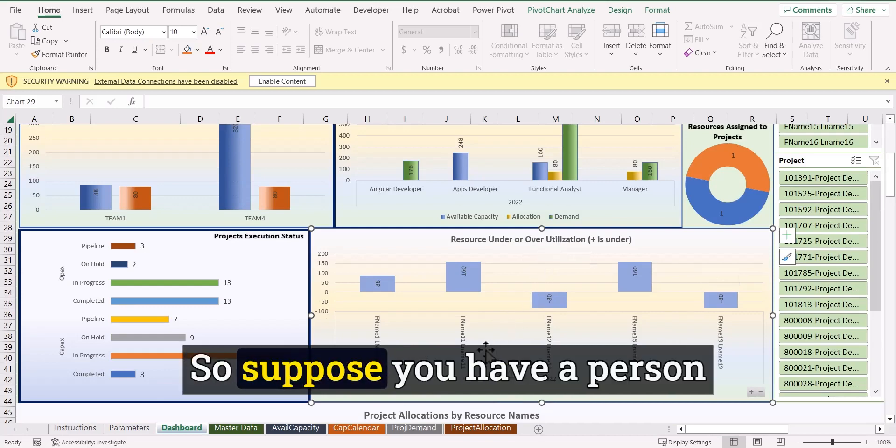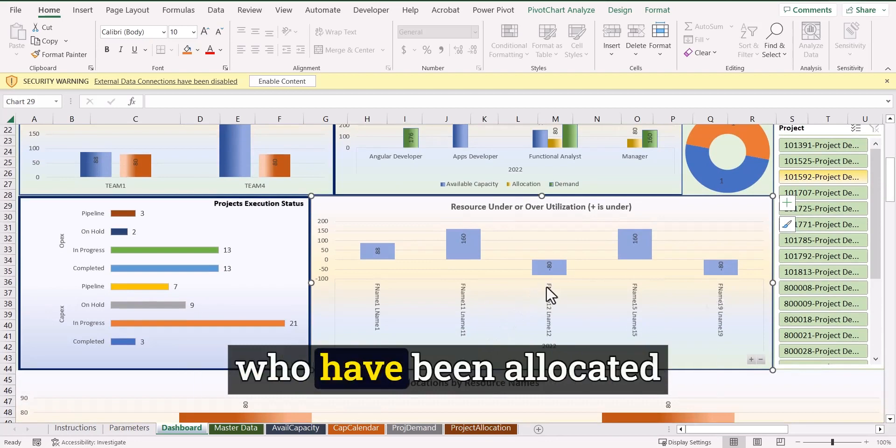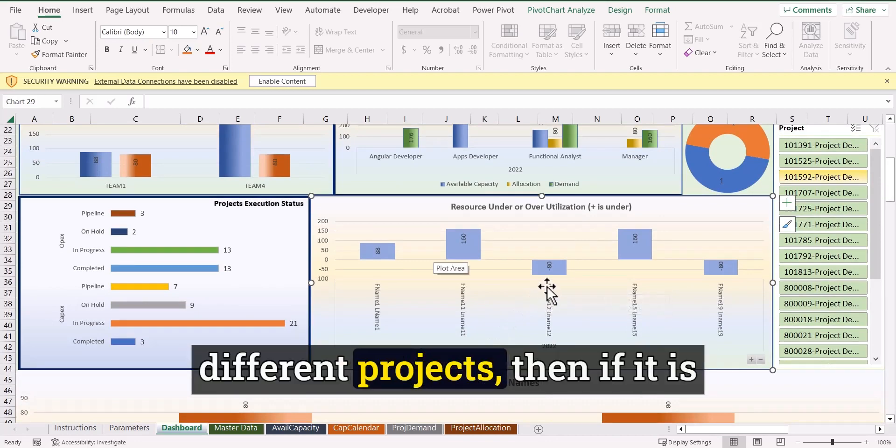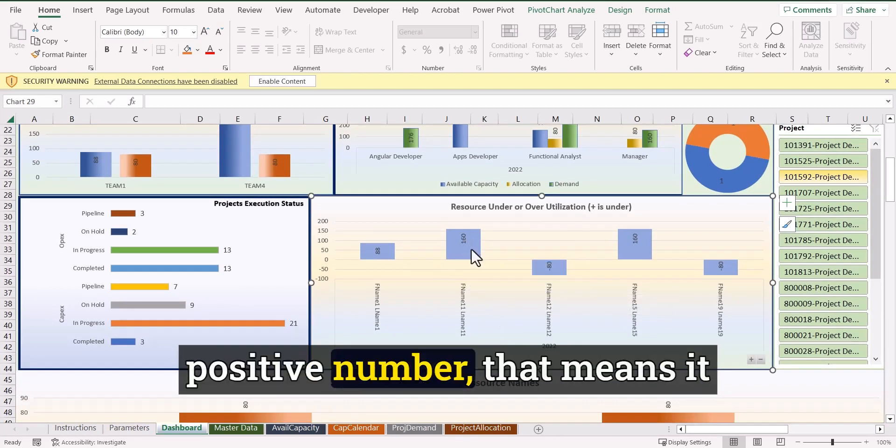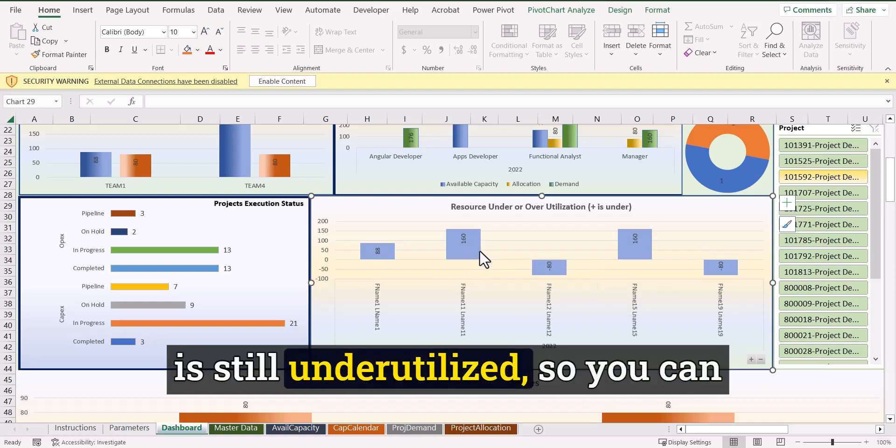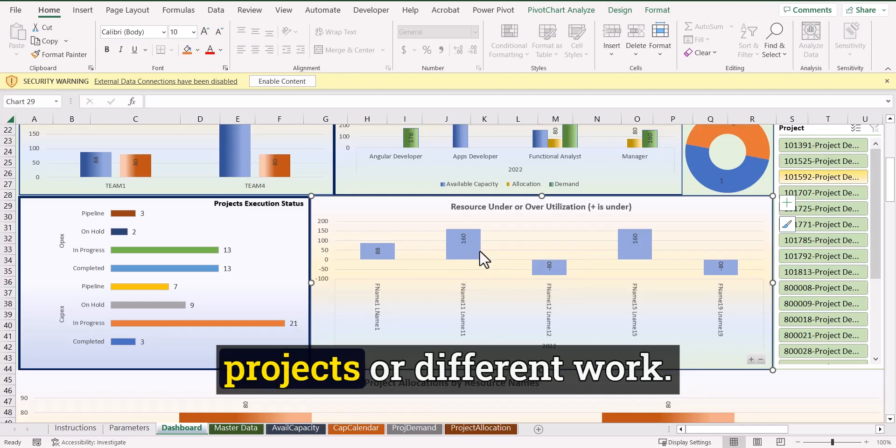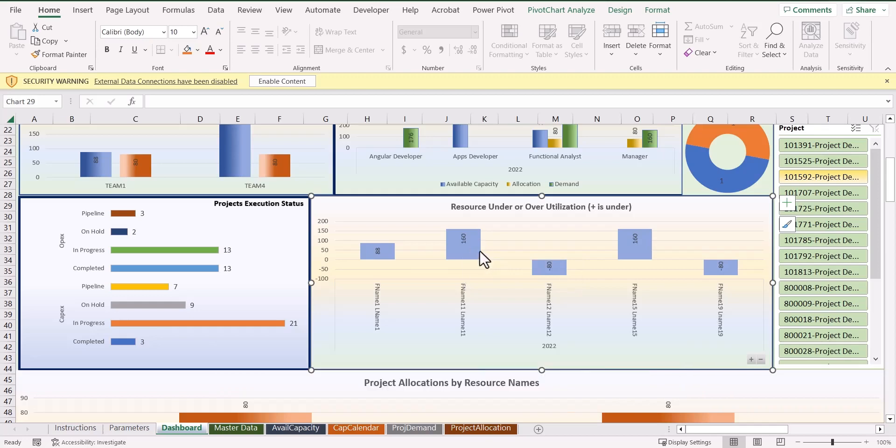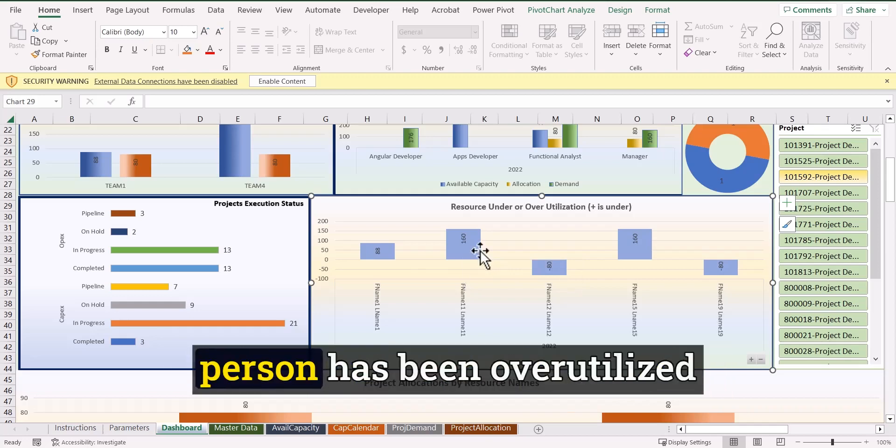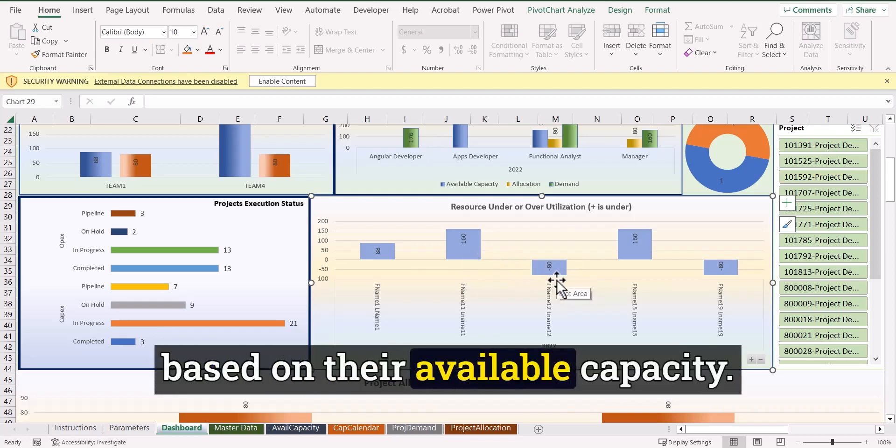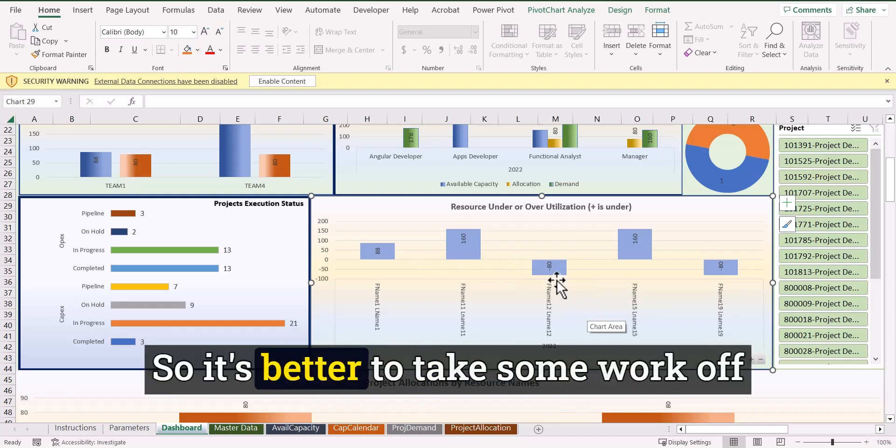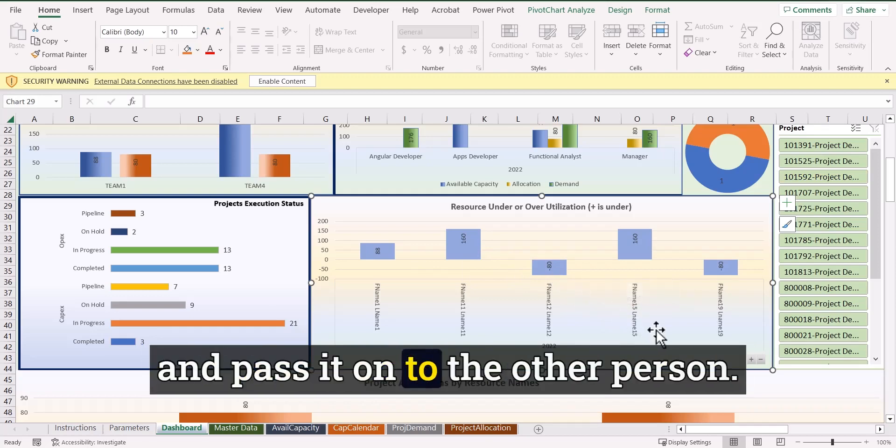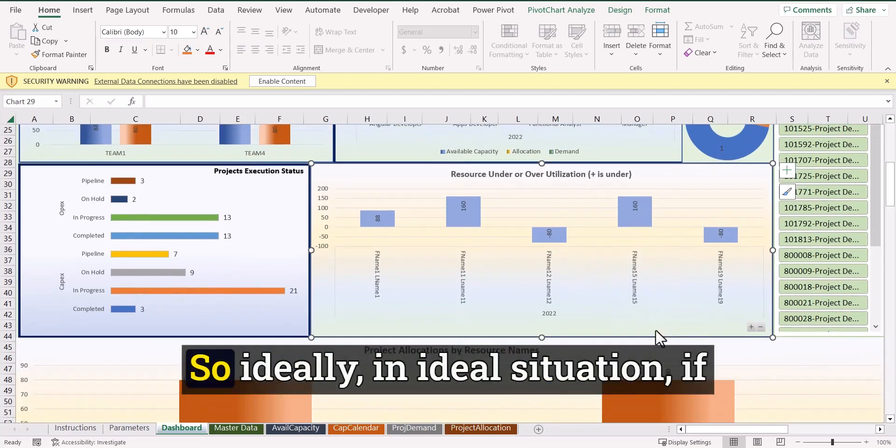So suppose you have a person who have been allocated different projects. Then if it is positive number, that means it is still under utilized. So you can allocate this person to different projects or different work. If it is negative, that means this person has been over utilized based on their available capacity. So it's better to take some work off and pass it on to the other person.